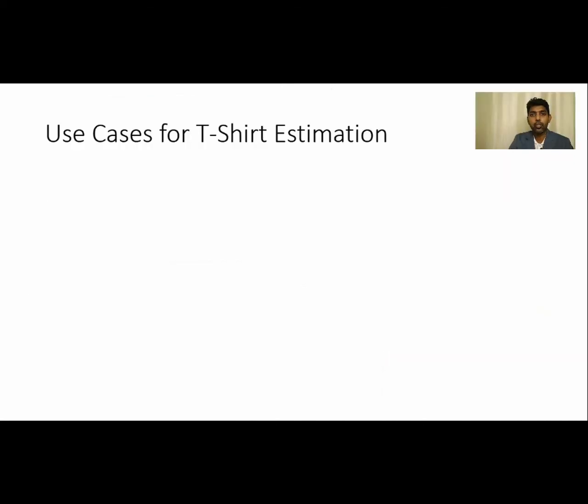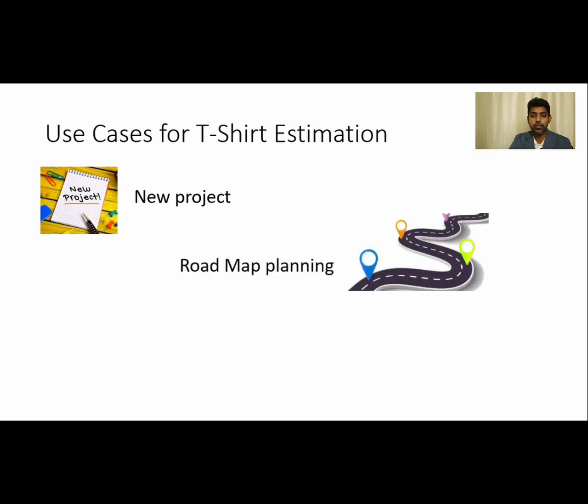Next, let us look into the use cases where we can use the t-shirt size estimation. It can be used for a new project wherein we have a lot of uncertainties, and if the management desires to get a ballpark estimate, we can use the t-shirt size estimation.